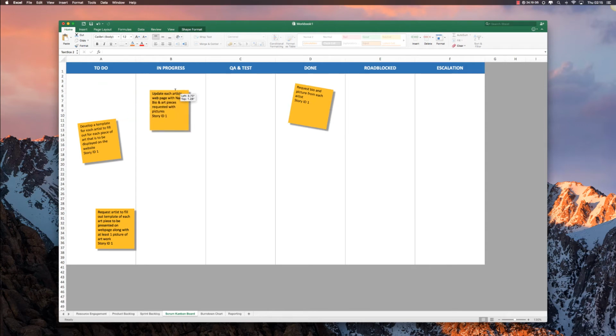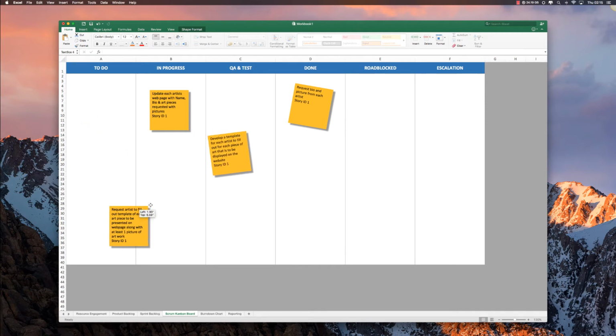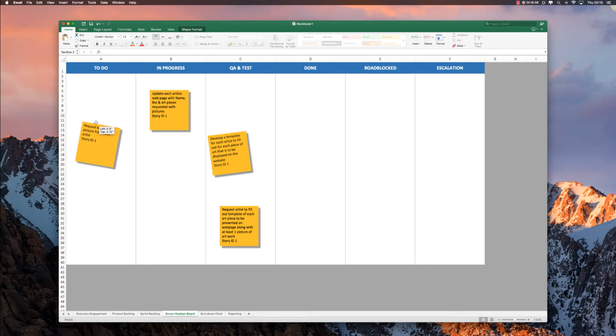And then you just have the other items that are being worked on by other team members, and they're being progressed by those team members. It should only be the team member that's working on the story that should move it through the board. And as the Scrum Master, if you notice that is not happening, and the way you can tell is during your daily Scrum, when they speak on the work that they're doing, if they have this that's done, getting the bio and picture and everything, but you take a look at the board and it's in the to-do, then okay, that's something that you can pick up with that individual, not during the Scrum, because that's not what the daily Scrum is for, but you can take it offline and just say, hey, whatever.